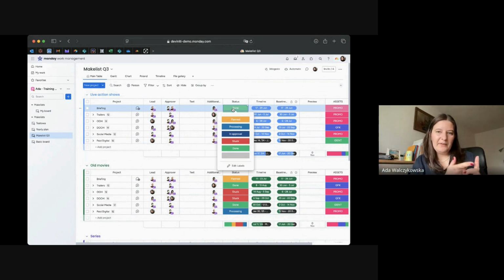For example, the main status column for overall project status, the second status column for sound mixing, the third one for finalizing graphics, for example, or anything else, so that you don't have these like half steps in every single asset production, because the more you put there, the more likely it is people will not use them. And if they don't use them on this point, you will end up in a project that is extremely messy, because part of the stuff is updated, part of it is not updated. So the simpler you keep it, the better for a big project.